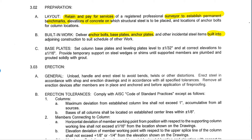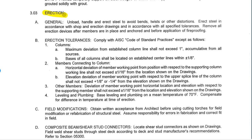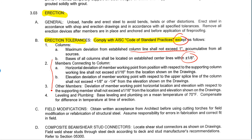Once we're building the structural steel frame, we get into the erecting of the steel frame, and we're looking at keeping to erection tolerances. It says specifically to comply with the code of standard practice — except as follows — and here's where we would override the code of standard practice. The code of standard practice typically allows for much more deviation, for instance in column vertical alignment and center locations. This is where the tolerances are much tighter, and if these tolerances are really tight, it's going to affect the cost of the project.